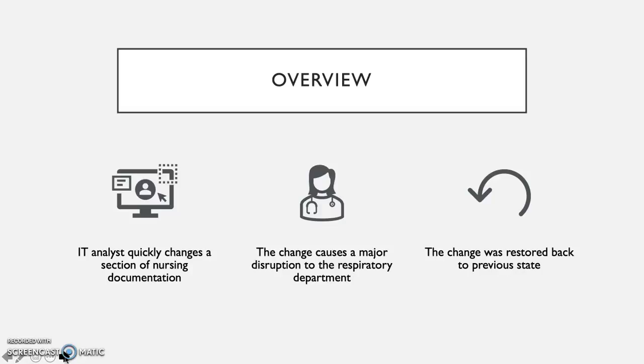The situation is there was a change made quickly, but it ended up having to be reverted to the prior state. The background is that a bedside nurse requested a change in regard to the nursing documentation, and an IT member quickly made the change. But the change not only affected the bedside nurses, but the entire respiratory department, causing the change to be restored back to its original state.